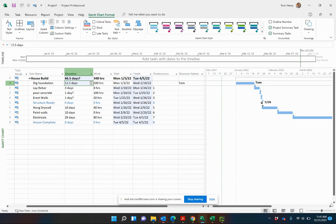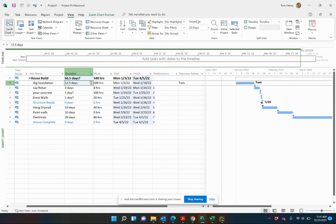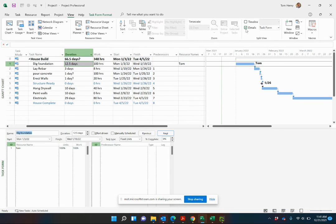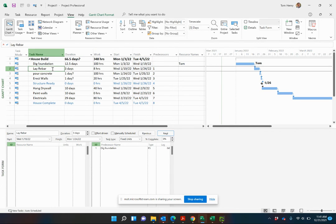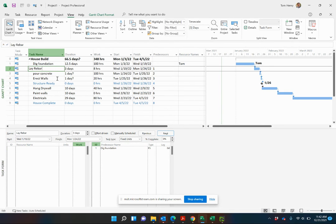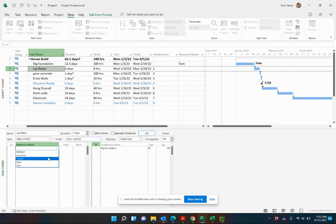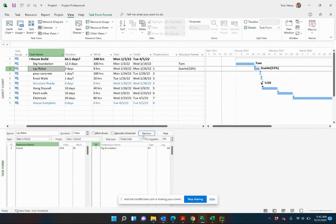If you really want to get a little bit more granular on this, what you can actually do is come to the view ribbon and check details. This is actually called the task form where we can see for a given task what's going on. So it's three days. We can see how much work is going on for this particular task. Lay the rebar. Now what we have to do is actually assign a resource in here. Put Skylar on that one. See how the work is calculated.